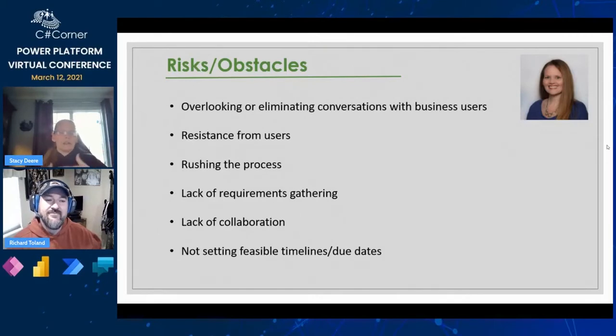Always communicate either to your client or to the department. Say, hey, I'm not going to be able to meet the deadline unless I have this by this date. Make sure you're documenting it too. Documentation is your friend, right? And put it back on them. If you give me this information by this date, I can still meet your go-live. If you can't, then the go-live is going to have to be pushed back. There has to be give and take.